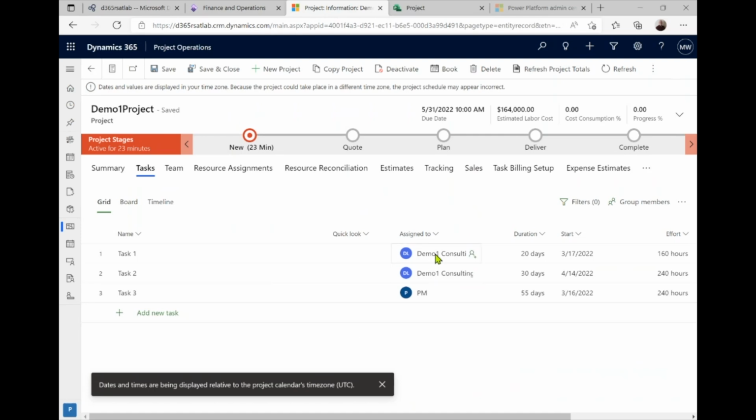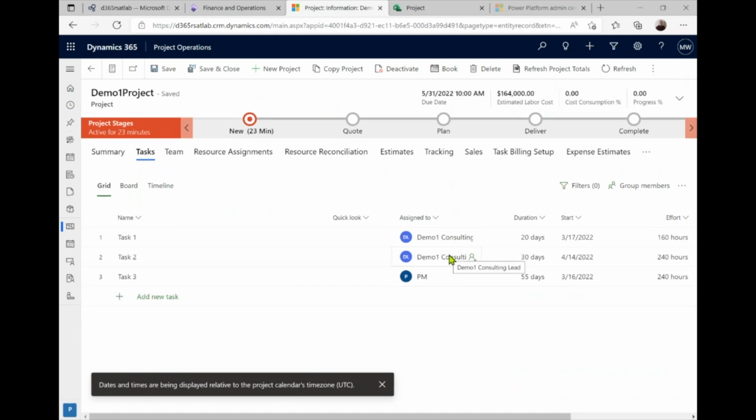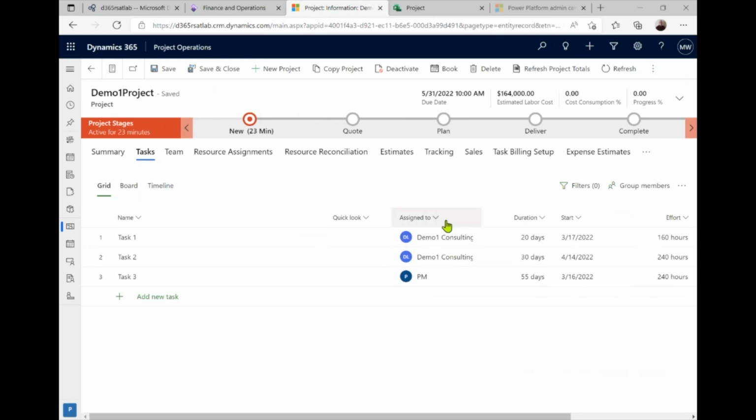Because the requirements could be completely fulfilled by the booking, it is automatically assigned the resources. If we weren't able to completely fulfill the requirement, or if it was a more complex way to satisfy it, then you would manually update the assignments from the generic resource to the actual resource.